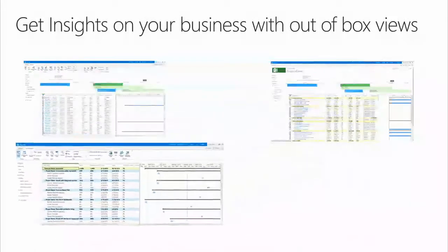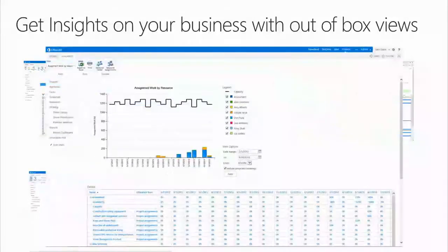And you can also look at resource availability, how much capacity your resources have and how they're being utilized, on a server also. So these are all server views. You don't need to do anything for them. You just select your resource, click on the resource availability, and it gives you this view. If you go to Project Center and filter, it gives you the right view.